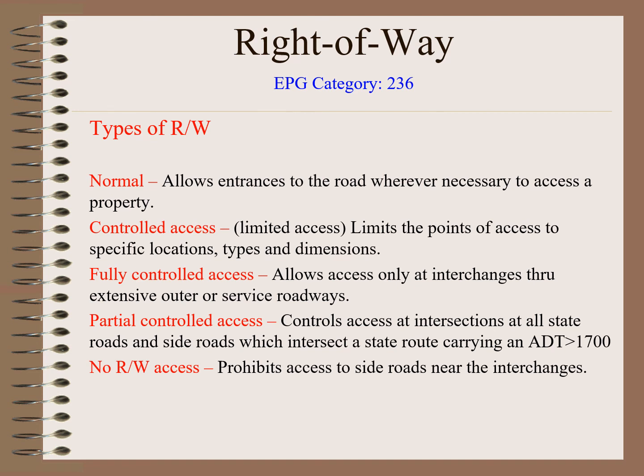A particular project may have all types of right-of-way involved in different sections of the project, so make sure you're documented properly on the legend what type of access you are acquiring. If no right-of-way access is being acquired, that also needs to be indicated on the title sheet as no right-of-way takings.